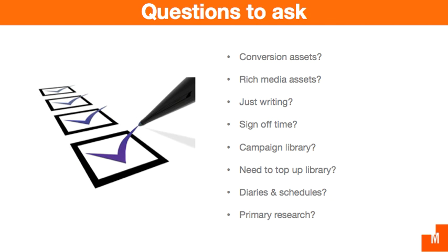So to start off your project plan, there's several questions you need to ask yourself. First of all is what conversion assets need to be created in this period? Then what rich media assets need to be created in this period? What writing work, just writing, so blogs, articles, social media needs to be done? How long is the sign-off time? Obviously, the larger the company, the larger the brand you're working for, the more sign-off you're going to need to get and more time you're going to have to accommodate for sign-off.